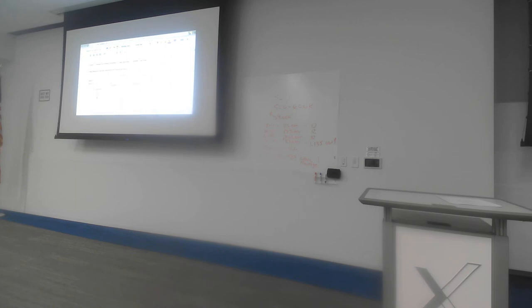Again, the duration here reduces from 18 down to 17. I'm going to crash E, no asterisk this time because I've got other days to play with after I crash it by 1 day. The overall cost of crashing activity E by 1 day at a time is €5. So the direct cost is €120 plus 5 is €125. Because I'm bringing it in 3 days early, I'm going to get a bonus of €24, so my opportunity cost is minus 24, and so my total cost is 101. And so again, it's going in the right direction, so that's good.